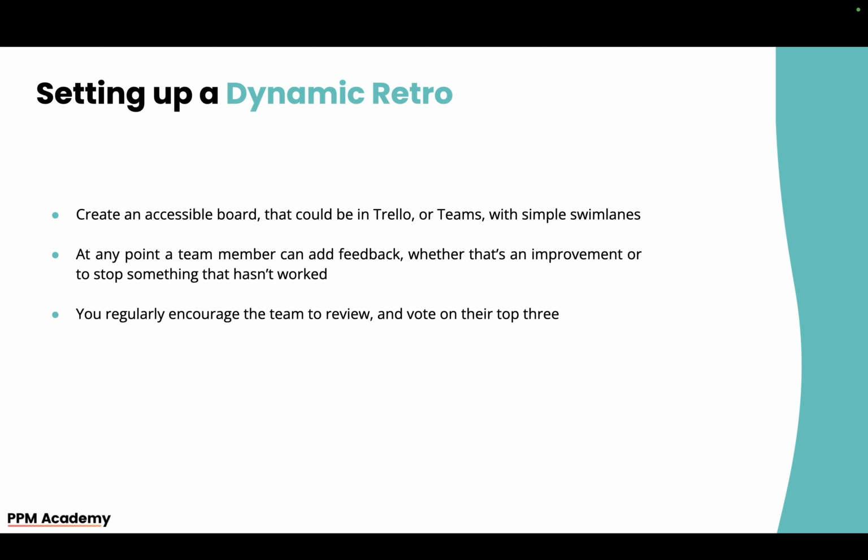Well, it really depends on how many you have in there. If there's not that many in there, then it's just, right, pick your number one priority right now, because the voting element of it is really important. Without voting, you're basing the changes on potentially your own opinion or just one individual's opinion, which isn't always great. You always want the team to be able to feed into it.